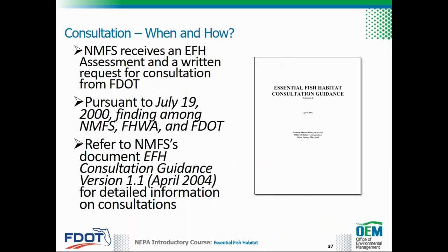Consultation is initiated when NMFS receives an EFH assessment and a written request for consultation. The district is responsible for submitting both the EFH assessment and the written consultation request. The negotiated procedure for conducting EFH consultation is specified in the July 19, 2000 finding among NMFS, FHWA, and FDOT. There are several key components involved in the NMFS consultation process.